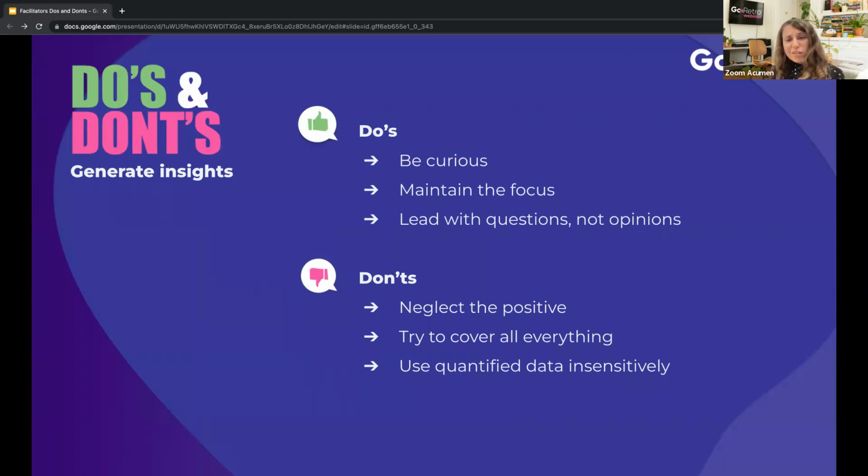So all of the cards, right? If you're lucky and you get a lot of feedback and you have a lot of cards, trying to cover everything also takes away from the focus. What I recommend doing is use the votes, sort the cards by votes to make sure you talk about what matters most to the team. If needed, again, a bit more extreme, but could be really helpful, there's also an option to only show the top 5 cards, and then everything else disappears, and you can really be focused on the top cards the team has voted on.